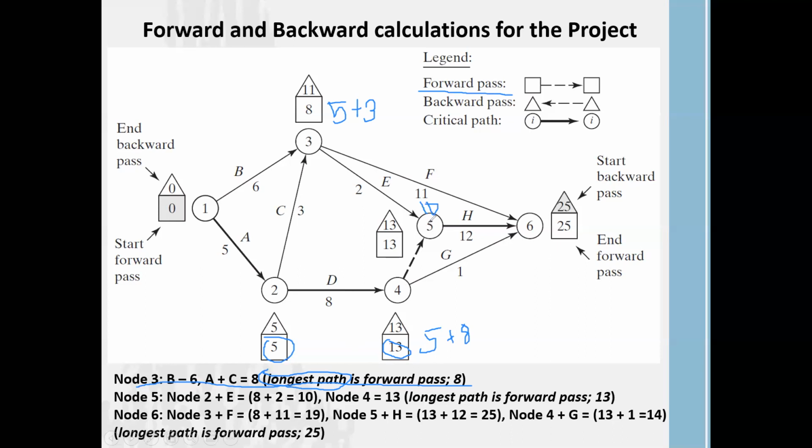5 also follows from task 4. Now task 4 consumes 13 weeks. Since this is a dummy, there is no completion time or activity time, so it is 0 here. Therefore, task 5, you can start after consuming 13 weeks because of the completion of activity A and activity D. Therefore, for task 5, you can see the forward pass is 13. Why is it 13?